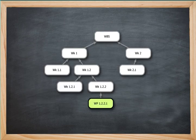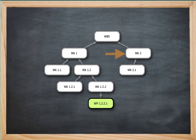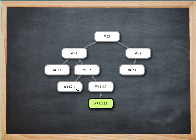So what does a WBS look like anyways? We'll use simple blocks to represent this. A WBS starts at the top and identifies the work — there are two pieces of work called Work 1 and Work 2. Within Work 1, we have two additional subtasks called Work 1.1 and Work 1.2. Under Work 2 there's only Work 2.1. But under Work 1.2, there's more detail required.